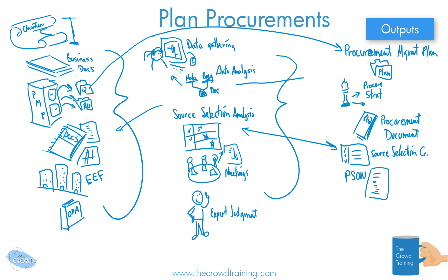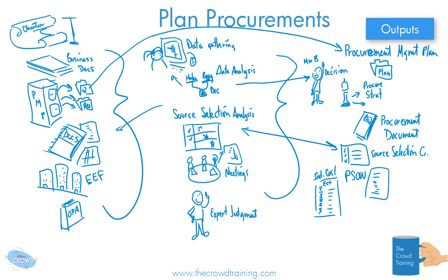Here we had the analysis of whether or not to make, buy, lend, or lease. So we should have a decision made as to what is the best course of action — that is our make-or-buy decision. We might also need to get research and facts to determine what the expected costs are for our needs. Ideally, we want to get something from outside for an independent cost estimate.